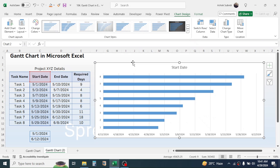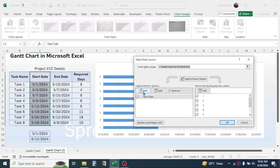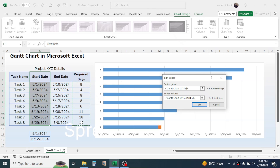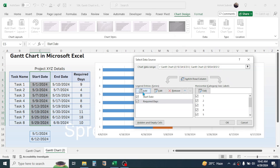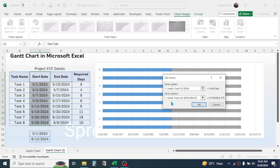Click on the data series, then right-click and go to Select Data. Click the Add button. In the series name, click on Required Days. In the series value, remove the previously given value, then select the days range and click OK. Again click Add. In the series name, click on End Date. In the series value, remove the default value, then select the end date range, then click OK.